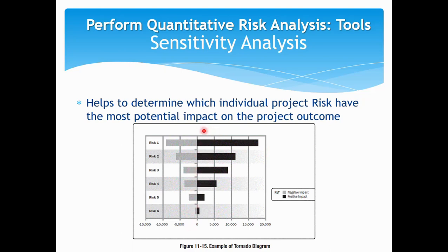This is the state we expect. We expect the shipment hardware to land in Sri Lanka by the 6th week, maybe on 15th of November. There can be a worst case scenario that the shipment can be in mid-December, or a positive scenario where the shipment can come in the last week of October. For each risk, sometimes you might be able to calculate the monetary impact. If it lands in mid-December, this is the cost. Since you have hired the database administrators, you will have to pay them and keep them waiting until the hardware has arrived.